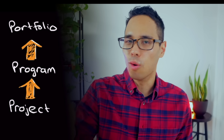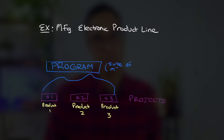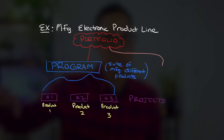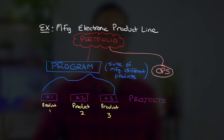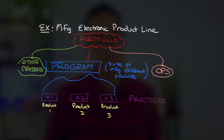To visualize these differences, let's use the example of manufacturing a product line of electronic tools. Each product would be its own project. The entire lineup of tools would constitute an overarching program — a program for the suite of electronic tools. The portfolio would consist of this program plus other projects, programs, and the operations needed to manufacture those product lines.